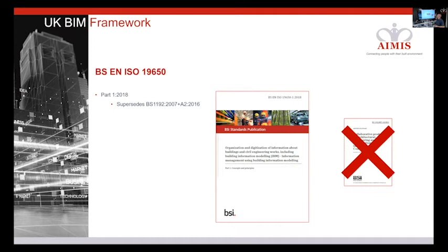This, incidentally, was the standard relating to sharing information in a common data environment and following a specific naming convention whereby all information is shared and named in the same structure, and also a coordination effort to make sure the same coordinate system was applied. It's not a like-for-like document, but it is specifically superseded by Part 1 of ISO 19650.